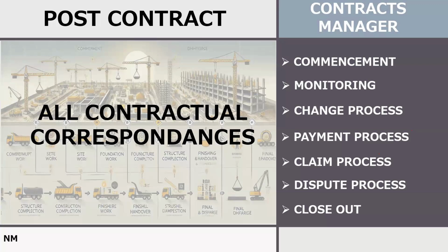So when you submit a statement of completion, the contractor is obliged to include all the due amounts that he expects under the contract. That means all the claims he is expecting to pursue or already pursued and not reserved, disputes expected under the contract, and all the works he expects to perform during the defect notification period.